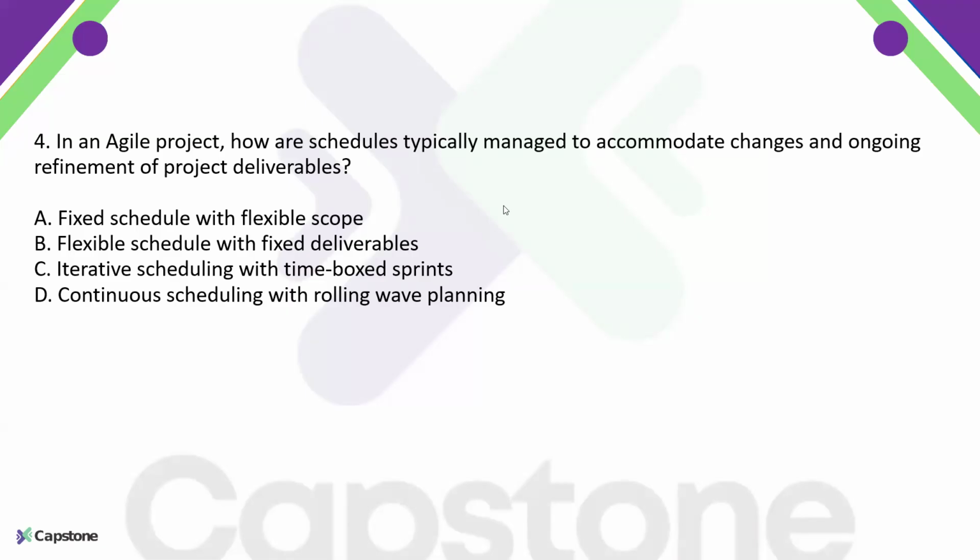Or they may ask you that, okay, we do not want the complete 100 user story points. Let's stop it at 75. So maybe you can close your schedule earlier as well. So in Agile, we have iterative scheduling, and time boxing is an important aspect of Agile.